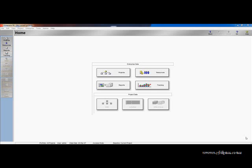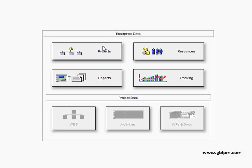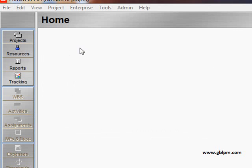To make a copy of a project, first go to the projects view to see all of the projects that you have available. Click on projects under enterprise data or go to the directory bar and choose projects.